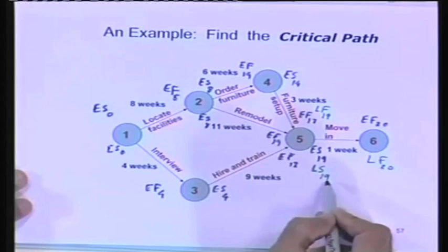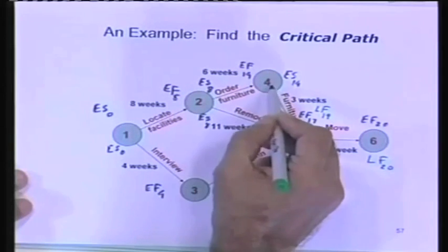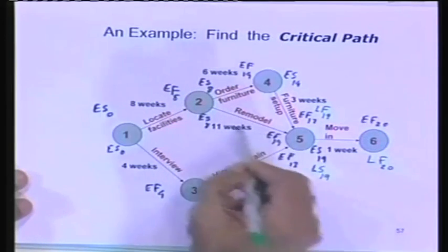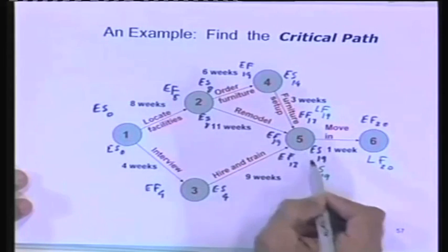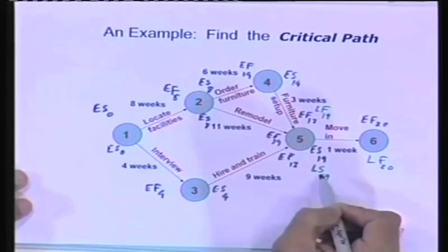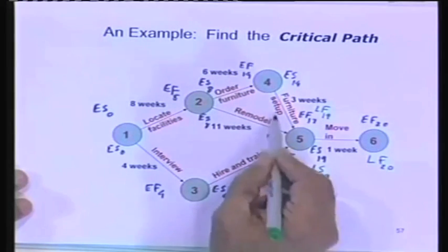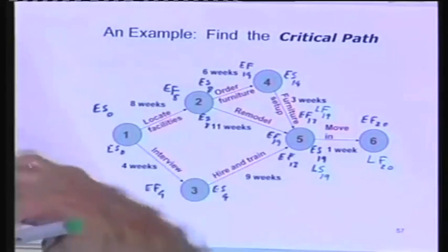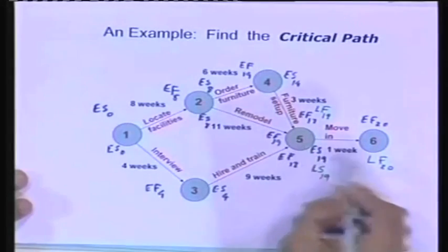Okay, now look at this one. This one must be completed, and also this one must be completed in order for this to begin. But the latest start of this is 19. If any of these get delayed even beyond that, then of course this task will get delayed.